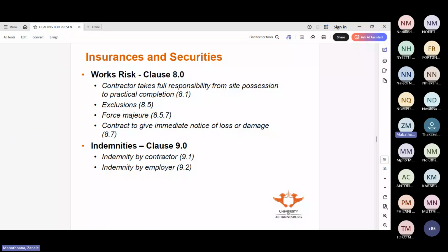We don't go too much underground unless you have to do bulk excavations for four levels of basement and stuff like that. With building contracts, we generally know what's going to happen because it happens on the surface. The minute we're out of the foundations, there's almost certainty, unless COVID hits and then suddenly we don't get material from China. So with building, there's a certain amount of certainty that we do not have when it comes to engineering works.